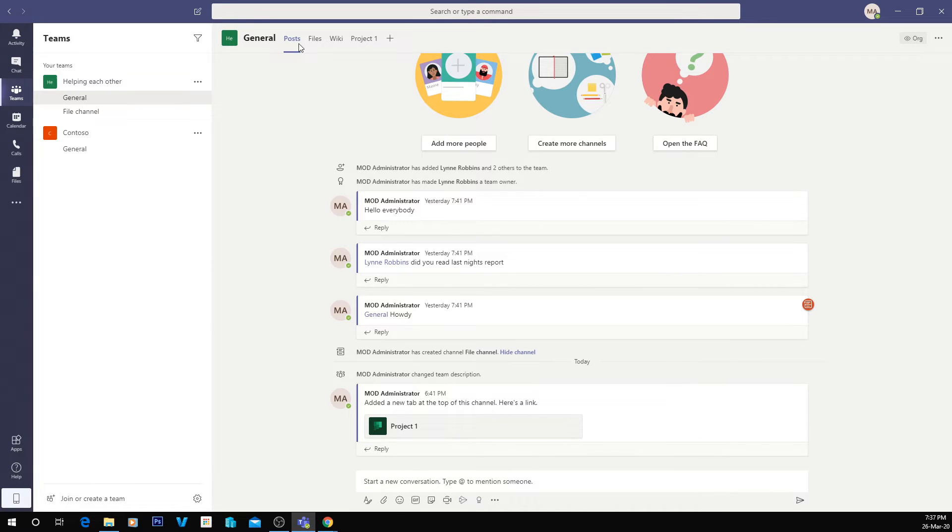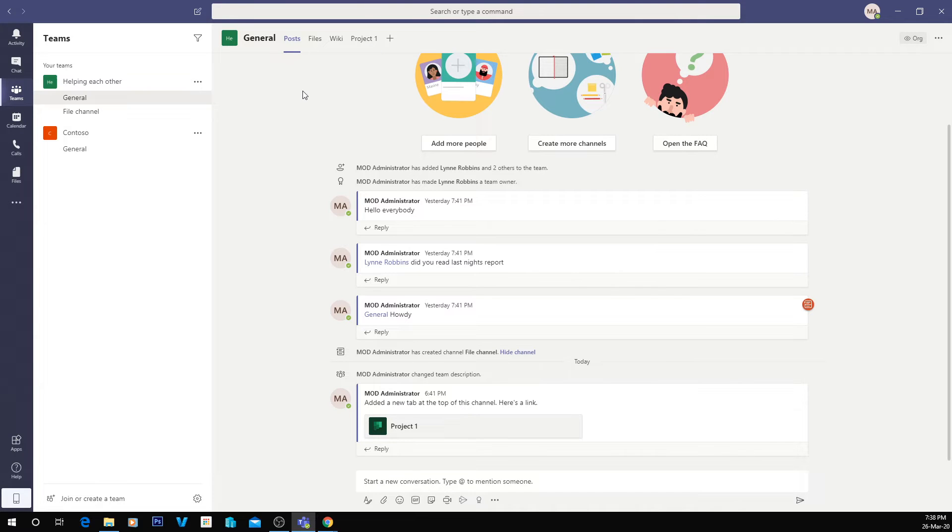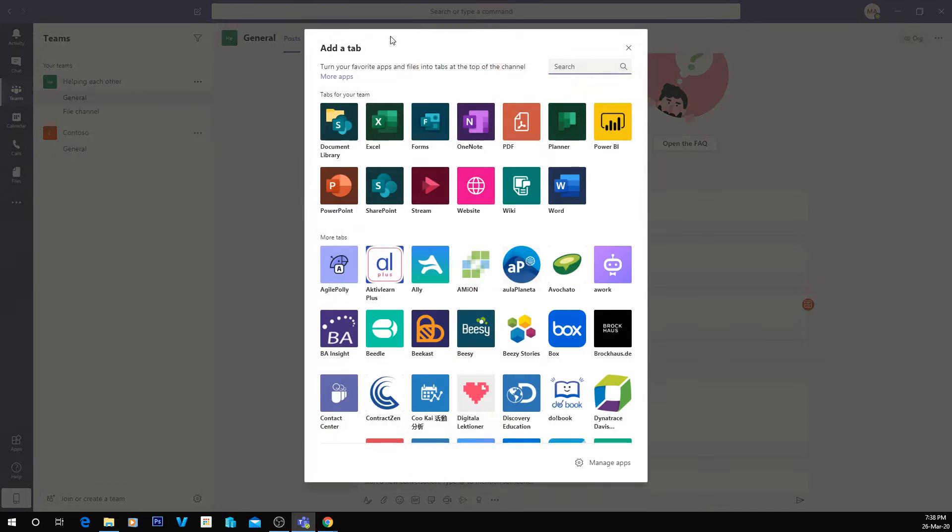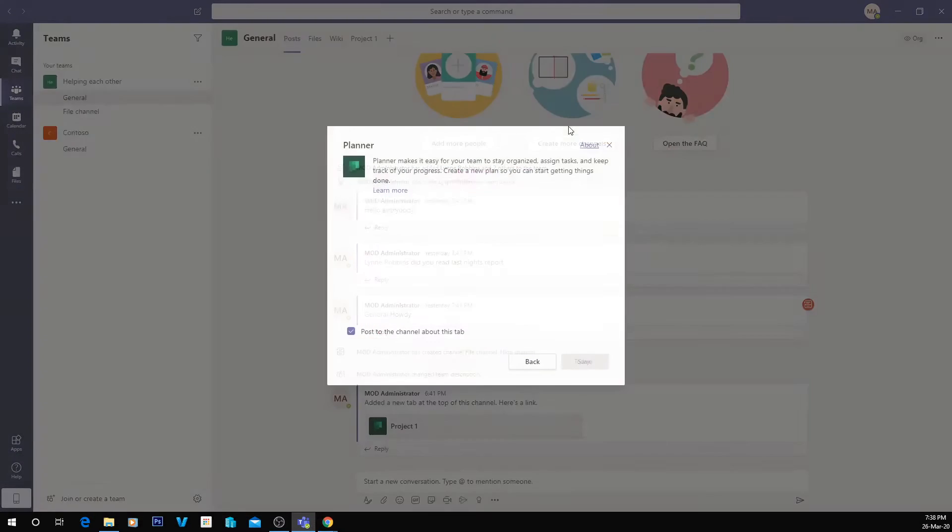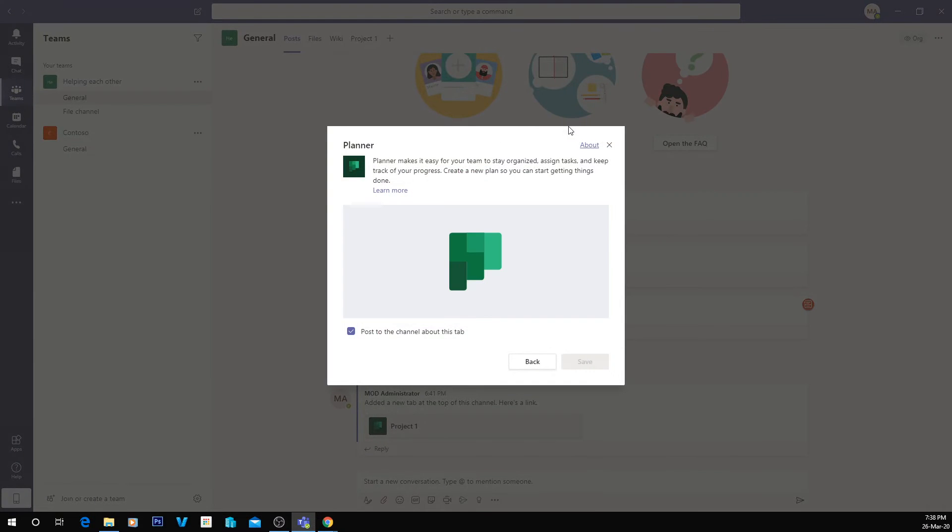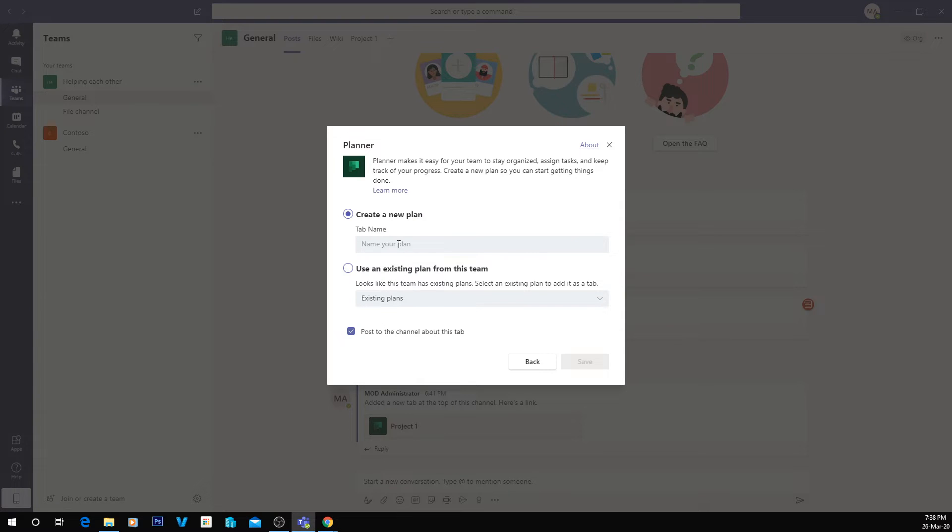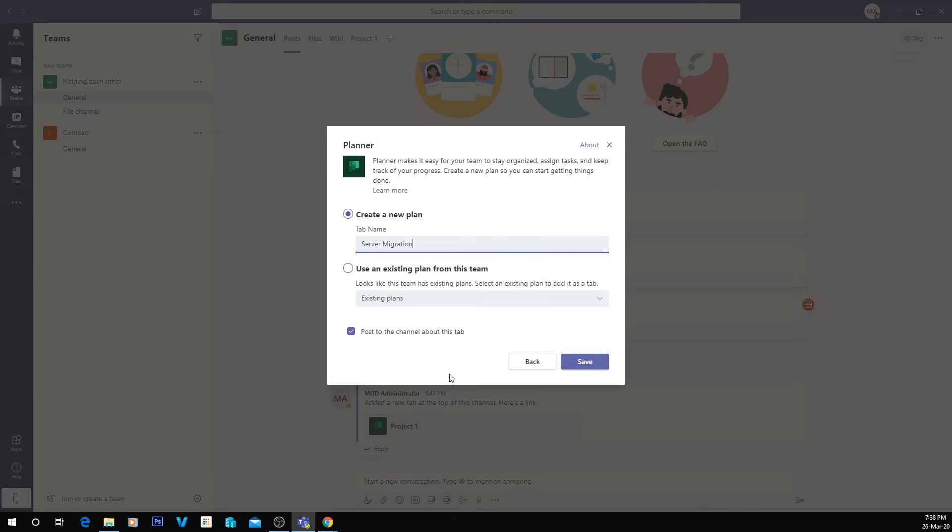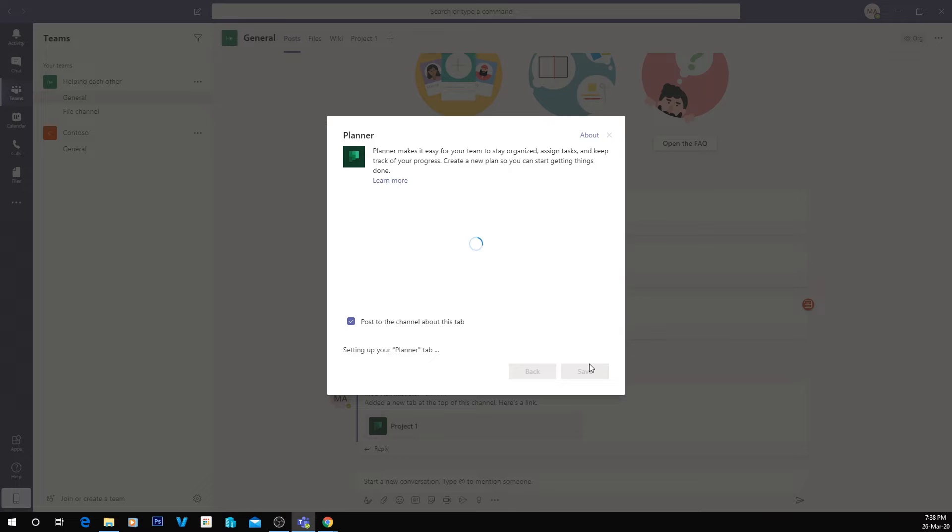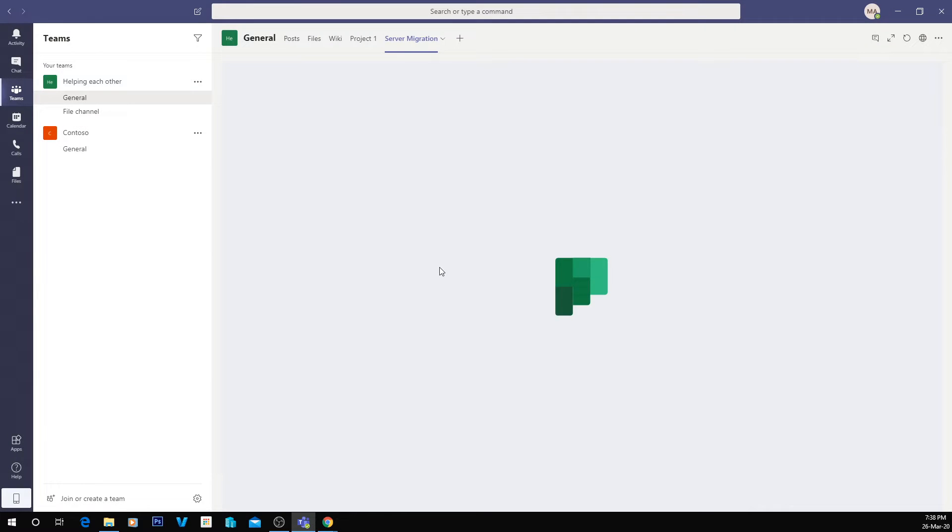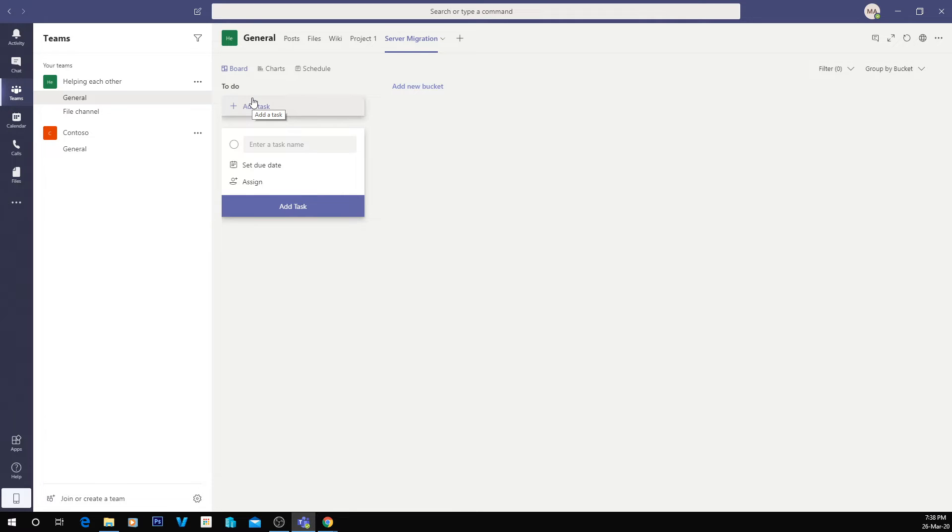What you can do inside of Microsoft Teams is embed the planner app into your team, into your channel. So pretty much to add a planner, what you want to do is hit this plus saying add a new tab. And in here we just select Planner. And what will happen is it will create a plan. And what I'm going to do is create a plan for a server migration. And if you have that tick box there ticked, it will post to the channel saying that you've created a new plan.